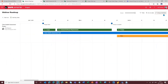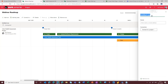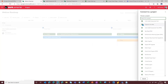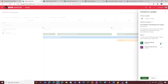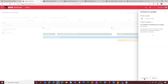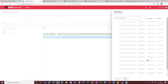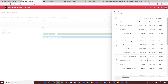Closing out of this, we're also going to bring in a project from Project for the Web. I'm going to add another row, and this time we'll call this Project for the Web, and I'm going to connect this to an existing project again. So that is now going to connect to the project, it's going to get the permissions, and we can see the two ticks across both of those. We've got permissions now for the project roadmap and for the Common Data Service, which is where the data resides for Project for the Web. Click connect.